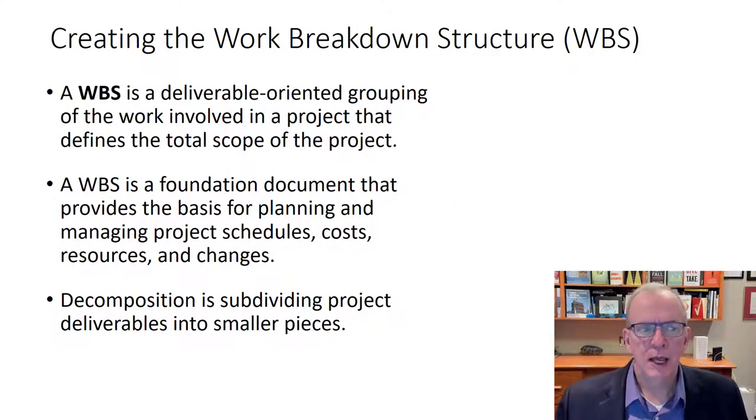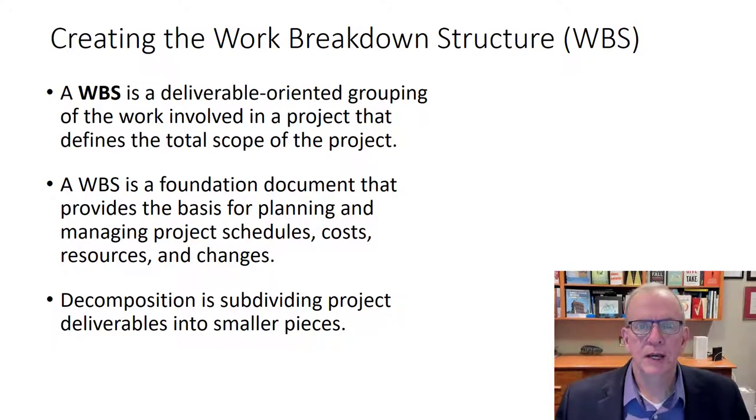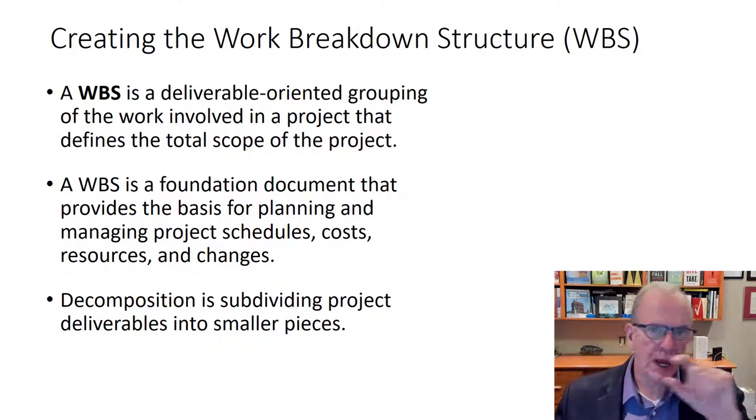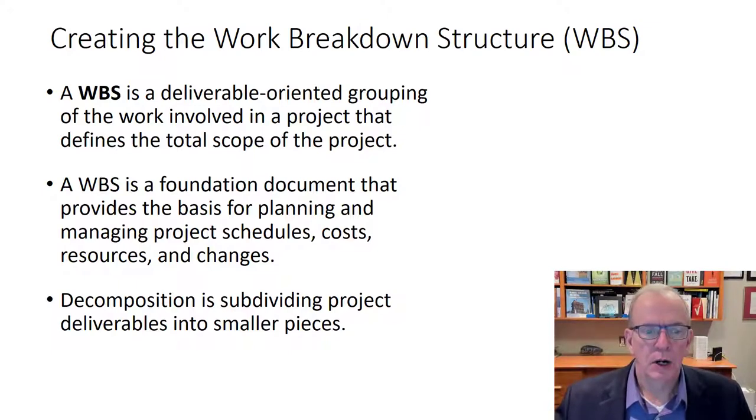It's really a grouping of work packages and activities at the lowest level that can be assigned to an individual resource that can be held accountable. But at the higher level, the work breakdown structure is the categories or areas of work that we are scheduling to. And so what we want to do is take something that's very, very large and break it down into smaller components.